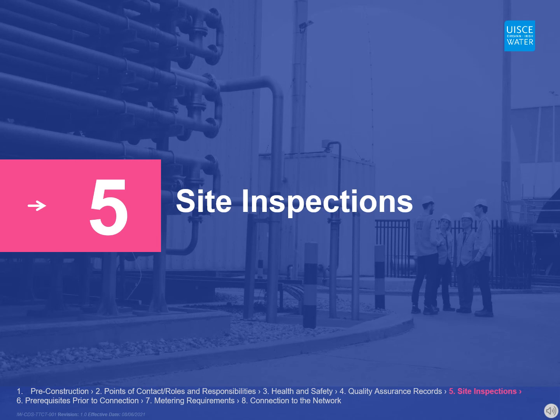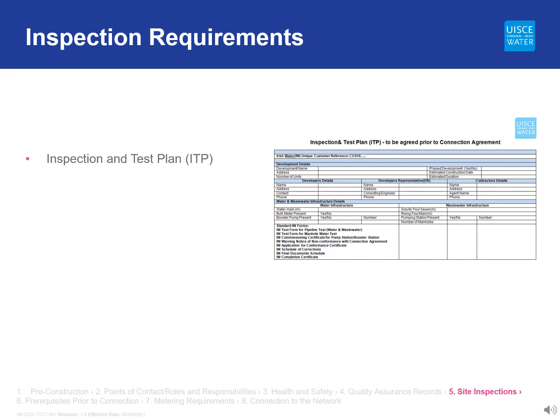Once construction begins, site inspections — both scheduled and unscheduled — are carried out by the field engineer to check for compliance with Irish Water standards. These inspections may be to monitor works in progress, witness testing, or to conduct a walk-off inspection. An inspection and test plan should be prepared by the developer's construction engineer in line with the testing and commissioning requirements outlined in the Irish Water Codes of Practice for both water and wastewater. The inspection and test plan should be forwarded to the field engineer for review and should include the proposed dates and sequence for testing on site. Irish Water must be given a minimum of five days notice before any testing, so that the field engineer can witness the test if required. The field engineer can request a retest of any part of the works if they are not satisfied with the test result or if they were not given enough notice. The construction engineer should arrange batch tests where possible to minimise the number of visits the field engineer has to make to the site.